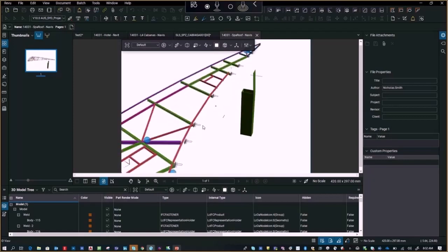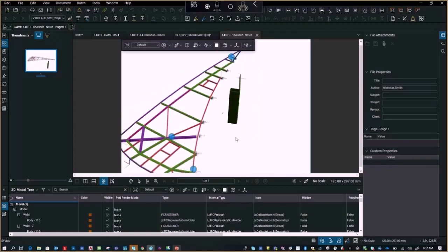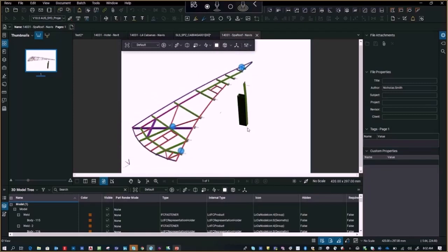Yeah. So for a subcontractor who maybe can't afford a CostX program or a large estimation package, Bluebeam can kind of get them there. Right now what people are doing is sending them plan after plan, the digital PDF plans, and they use the plans to get the quantities out. But if you were to send them an IFC model, the entire model, they can get the whole building in one go, rather than going through plan after plan after plan. You know what I mean?